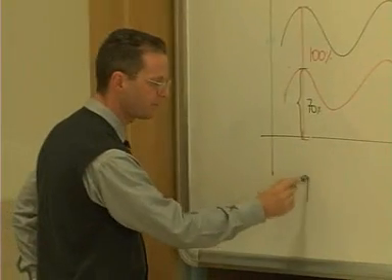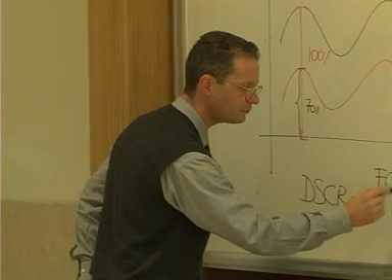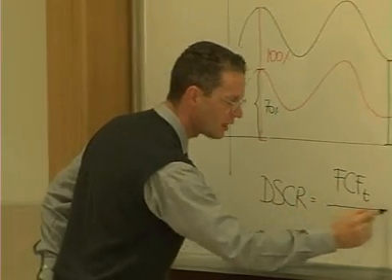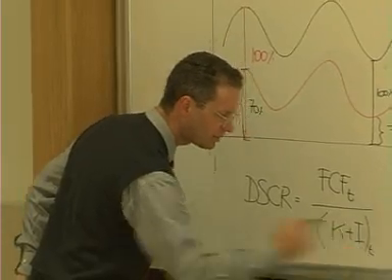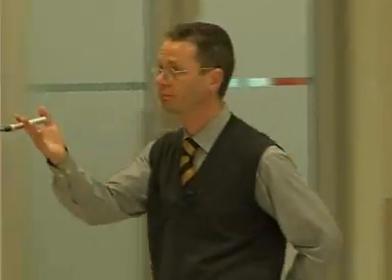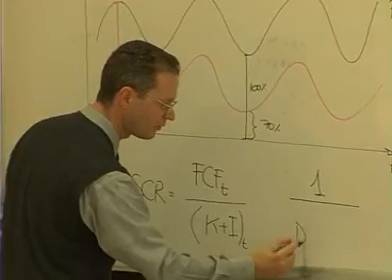There is an interesting application of the dedicated percentage because we can easily demonstrate that the dedicated percentage is the inverse of the debt service cover ratio. You know that the debt service cover ratio is the ratio between the free cash flow relative to time t and capital and interest relative to time t. You know it from our past lecture. Now, invert the two terms of the equation. We can write that 1 divided by debt service cover ratio